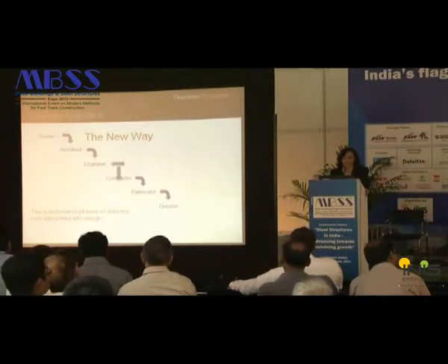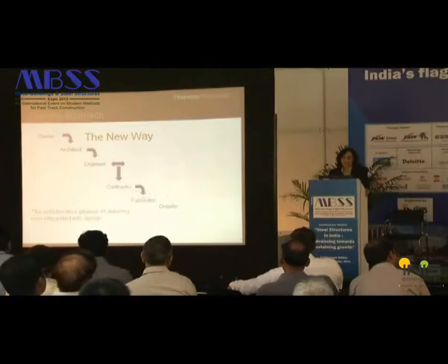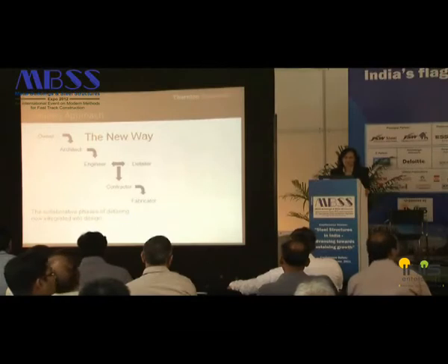If you see, the engineer and contractor are working together, and it saves this linear time, the time the contractor used to take to get it to the fabricator and detailer. It's all changing. So it really saves a lot of time, and 3 to 6 months in a construction schedule, as you all can understand, is a tremendous saving for the owner.